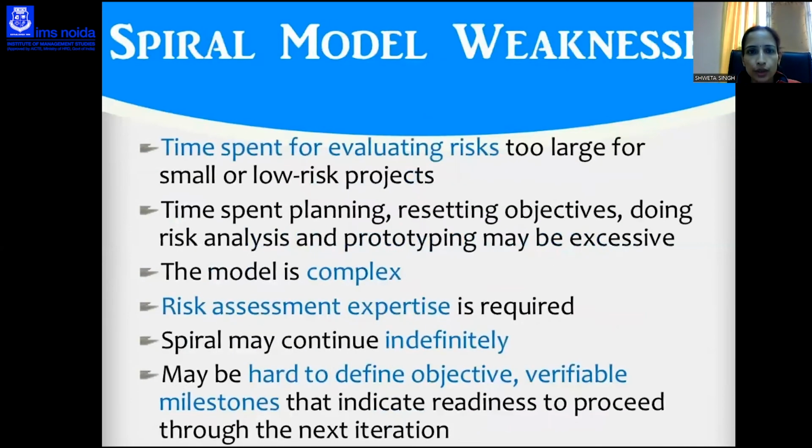There are some weaknesses. Time spent on risk evaluation is too large for small or low-risk projects. This model is complex. Risk assessment expertise is required. Spiral may continue indefinitely. It may be hard to define objective, verifiable milestones that indicate readiness to proceed to the next iteration.